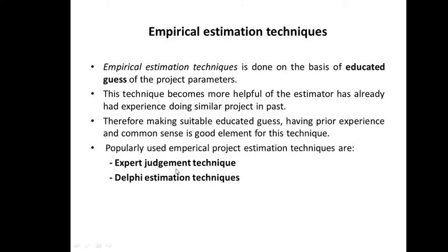definitely it will be an accurate one. But there is a problem associated with the expert judgment technique, because if you ask just one expert to make the estimation regarding the cost and the time, no one is perfect, right? Maybe he has knowledge in tens of parameters, but one is left out, and for the parameter which is left out, maybe the guess doesn't work. Or maybe the person is biased towards a particular person, say the project manager or the customer, so he might get influenced.